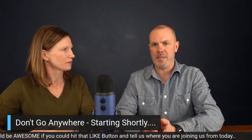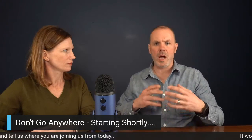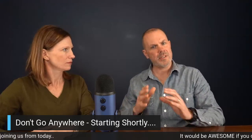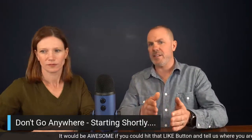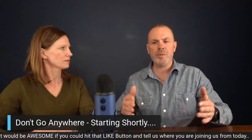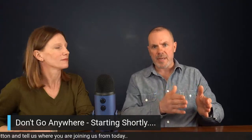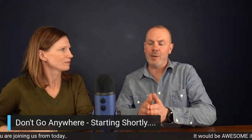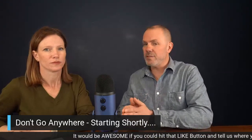So what does that mean exactly? Basically, it is this: a customer comes to you with a complex plan, which is great. And we say, all right, well, we can build that. However, if you were to make X, Y, and Z changes, it works within the parameters of how we design and build. We can get more done in the manufacturing plant than we'll have to do on site, which is saving us money. So there's value engineering.